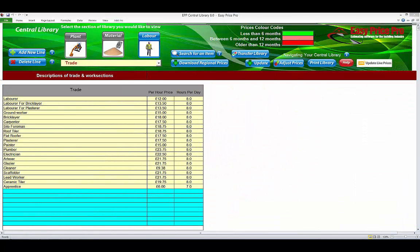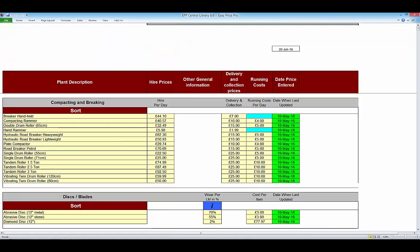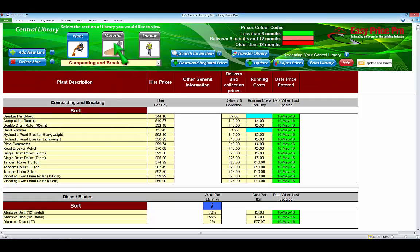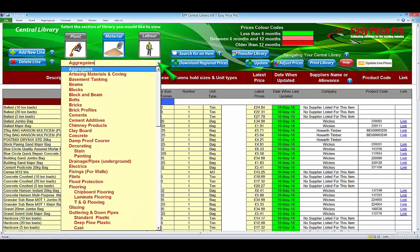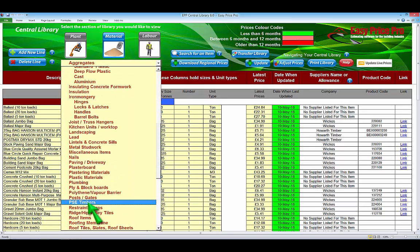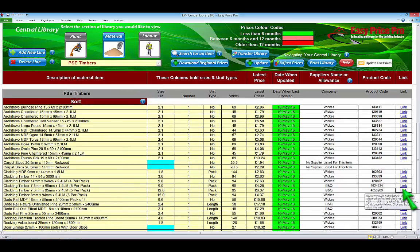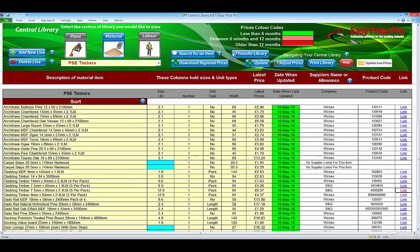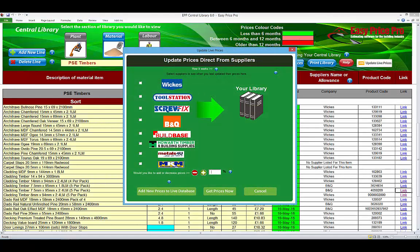It also comes with the central library. This is where the trade, plant and material costs come from. The fully adjustable central library contains the details and price information for thousands of items. They have live links to a large selection of the major suppliers. At the click of a button, you can bring the latest live cost into your programme, straight from the suppliers' websites.